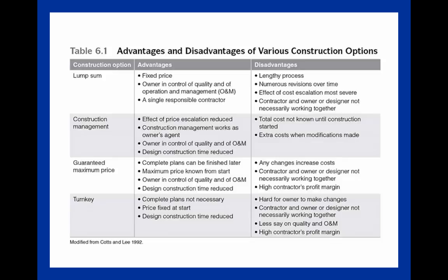A lump sum construction contract is really going to be situations where the costs are known for this project at the start. And if the costs rise, however, the quality of that construction might be forced to lower. Now, another one that might be desirable is the guaranteed maximum price, which is where you actually have a company that's going to list what is going to be the fixed costs and going to be the maximum price. And here it's really that the cost is known from the start. But again, any sort of changes to that max price is going to change the cost.